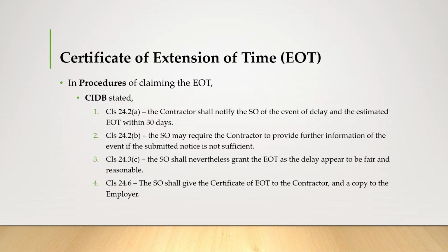In clause 24.3c, the SO shall nevertheless grant the EOT if the delay appears to be fair and reasonable. And lastly, in clause 24.6, the SO shall give the certificate of EOT to the contractor and a copy to the employer.